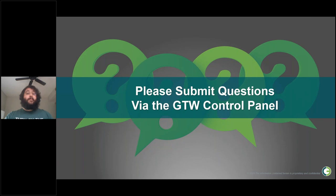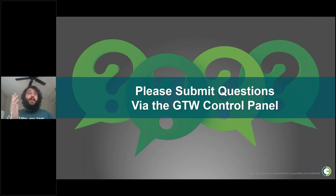Who needs to be involved in the beginning, and do they continue to be involved? The first person you want to identify is your sponsor — they'll be involved pretty much all throughout the project life cycle, but more so on the sidelines, securing buy-in from higher-ups and maintaining it via project updates. The second person is your AWP champion, who is way more integrated into the whole process and will ultimately be leading your implementation of AWP. Eventually, everyone gets involved — from your construction managers and work-based planning coordinators to your field personnel.